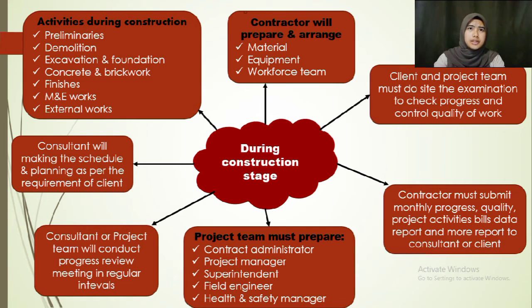Consultant will prepare the schedule and planning as per the requirement from the client. And also, consultant or project team will conduct the progress review meeting at regular intervals. Contractor must submit the monthly report or other reports to the client and also to the consultant. Most importantly, client or project team must do the site examinations to check the progress of work, also the quality of work at the site.